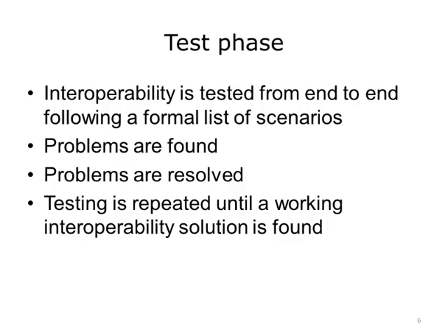The testing phase of a project is when interoperability is tested from end to end, following a formal list of scenarios. Problems are detected and resolved, and then testing is repeated. These steps repeat until testing is fully successful.